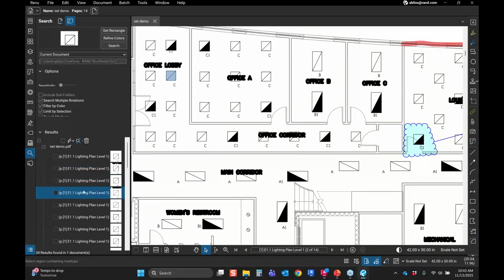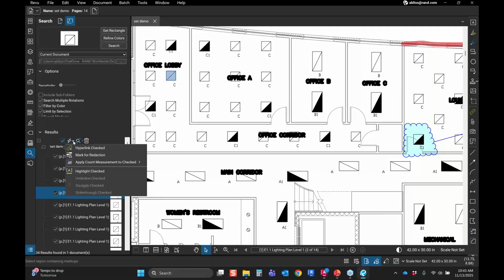And so it has this ability, it's searching with an eyeball, the AI-assisted buzzword search feature where it can use its robotic eye to scan through the document, looking for that. So there's no magic sauce where it's detecting, say, a line at a 45-degree angle and getting that data from the AutoCAD conversion. No, this is using an eyeball, and it goes, okay, that little thing that you showed me, I'm going to tell you every other time I see that thing. We told it that thing visually, and then it went through and found it. So really cool, really powerful thing for doing your quantity takeoffs.